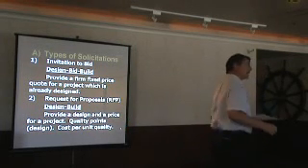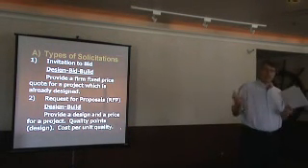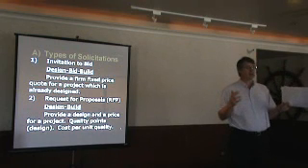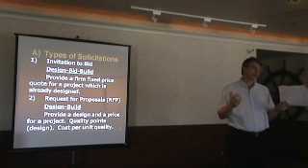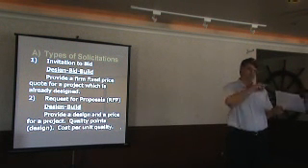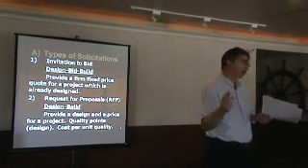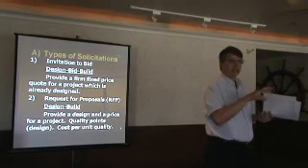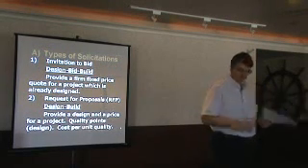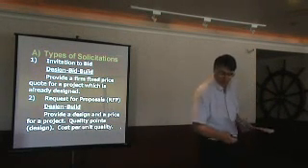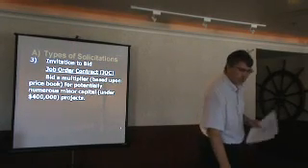So in that situation, the separate part of your bid is your cost proposal that says what your total dollar amount is, and then we use a multiplier from the evaluation committee on the quality points, multiply that into your total cost, and then rank the bidders. So if you're not familiar with design build, now you are.